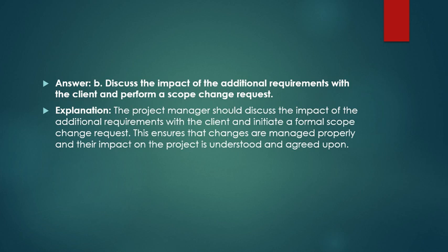Discuss the impact of the additional requirements with the client and perform a scope change request. The project manager should discuss the impact of the additional requirement with the client and initiate a formal scope change request. This ensures that the changes are managed properly and their impact on the project is understood and agreed upon.